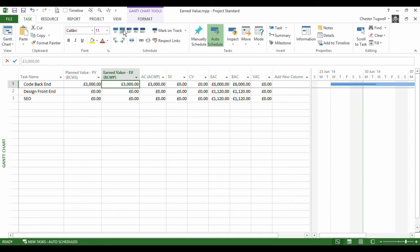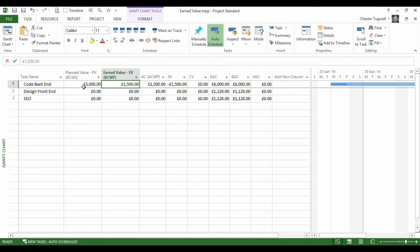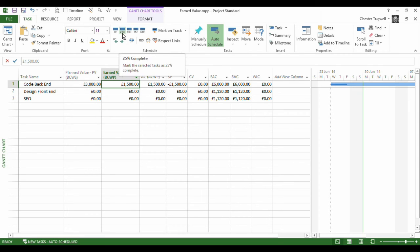But if I said, actually, we've only done half the work we should have completed, so I've said 25% of the total task. Look, the earned value is now £1,500. Planned value, we should have spent £3,000, but we've just said we've only spent £1,500 because we've done 25% of the total task, which is half of what we should have done halfway through the task.